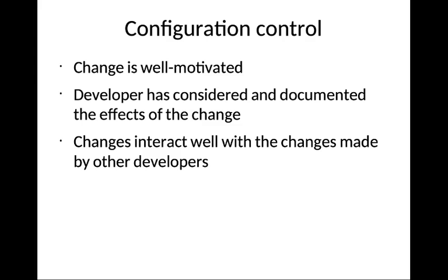Then the CCB will check whether the changes interact well with the changes made by other developers. If we have changed some module, and that module is interacting with other modules, whether there will be any problem with that interface will be checked by the CCB.